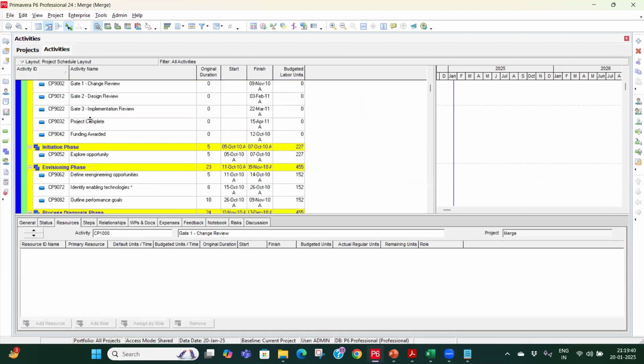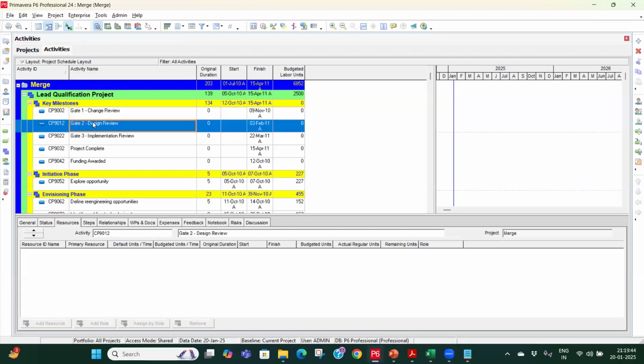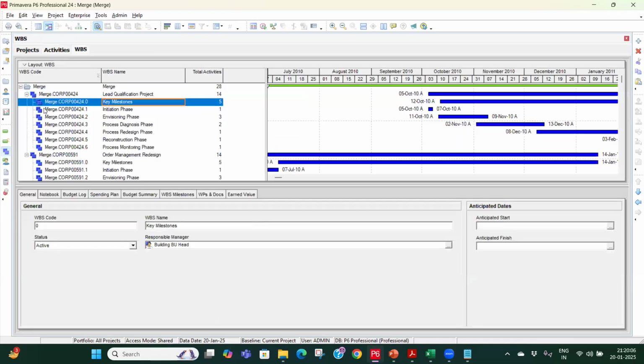So I want to create a WBS of that project. For example, if I am in an execution project, like one project where I am having supply, execution, and procurement, I will make three WBS: supply, execution, and procurement. No worries.